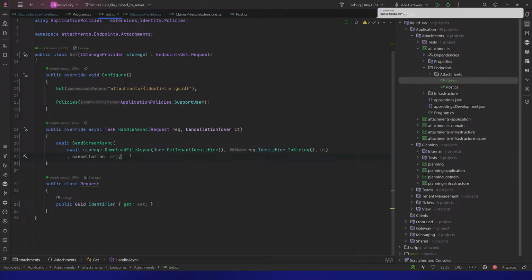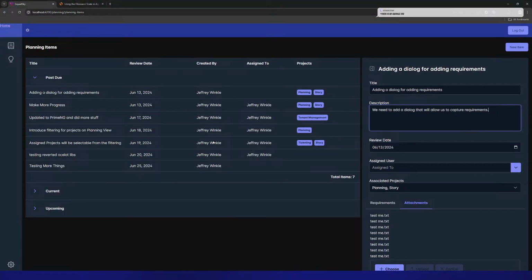Should the person doing the work get the final pointing vote? No, because the person who's doing the work shouldn't actually be in there at all at that point, right? Because the idea of an actual agile backlog is that anybody can take any work, which is why it's important to get the pointing. So you shouldn't do assignments of the work before you even point. The backlog should be available for everyone to take.